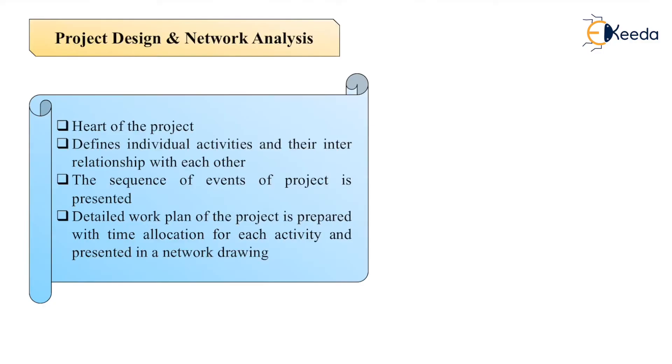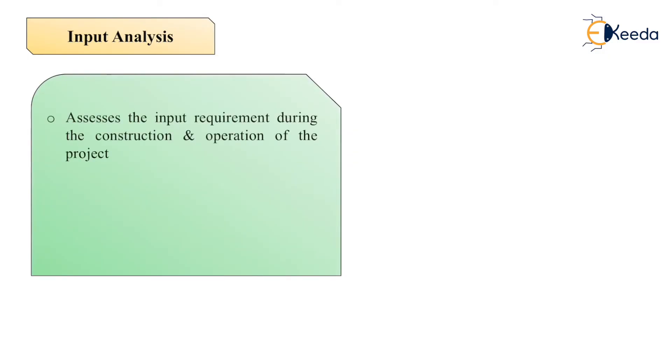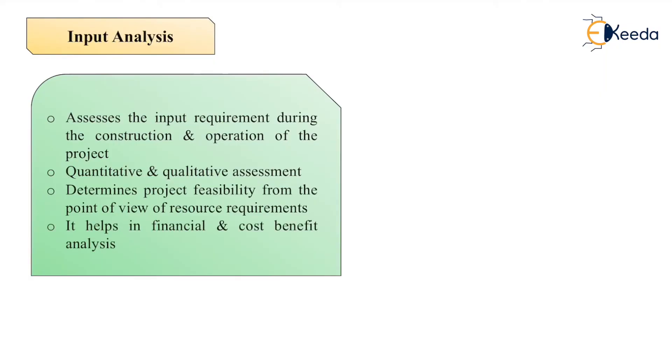Then it comes input analysis. It assesses the input requirement during the construction and operation of the project. Quantitative and qualitative assessment is done. It determines the project feasibility from the point of view of resource requirements, whether it is possible to get that resources from the nearby area or not and what will be the cost of it. And it helps in financial and cost-benefit analysis also, so input analysis is very important.